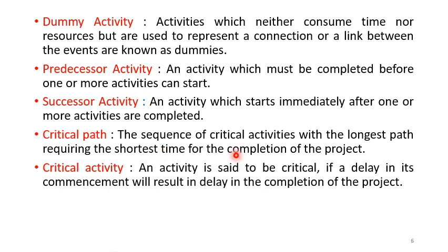But keep in mind, this longest path from start to finish will be the shortest time for completion of the project, because only if that path is selected, since it is the critical path, will all other activities be completed, and that will be the minimum time required to complete the project. So the maximum amongst the paths is the minimum time required to complete the project, and that is the critical path. In other words, the activities in the critical path cannot be delayed at all.